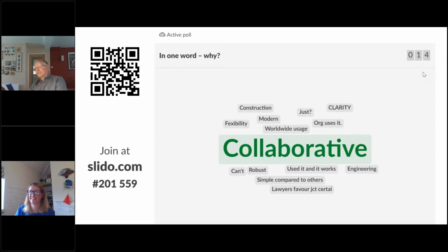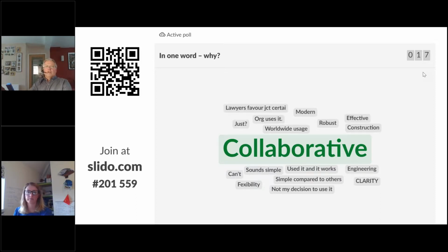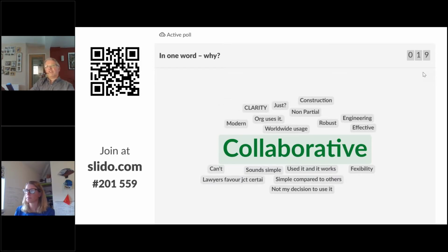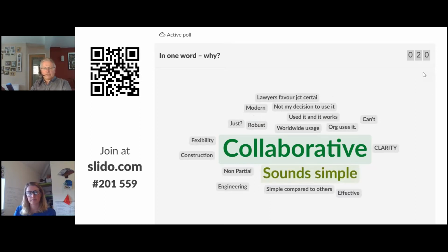Yeah, so adjudication is the first line of dispute resolution. And then if either party doesn't like the adjudicator's decision, they are allowed to take it off to what's called the tribunal, and there's a specific box in the contract where the client decides whether that final dispute resolution facility is going to be arbitration or the courts.